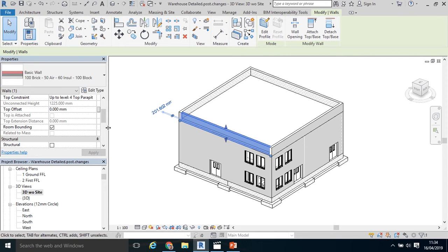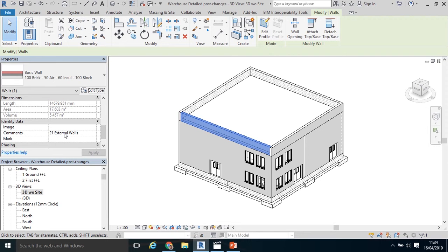So in Revit, in the previous tutorial, we selected our wall, or we selected our window or door, our object essentially, and we coded, in this case, a national standard building element, an Irish work breakdown structure, to the comments parameter in the identity data. We did that because it's quite simple. It shows up in the properties front page.